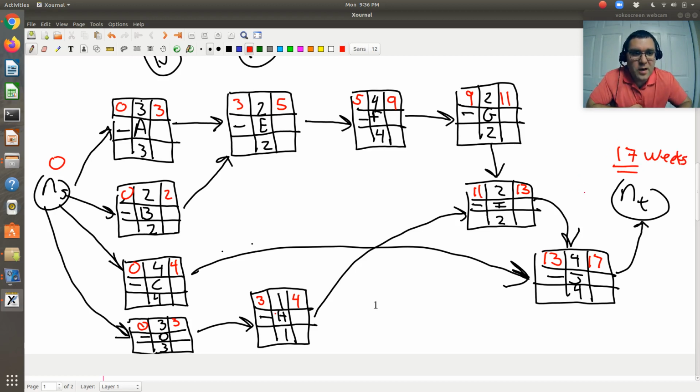All right. So now what I'm going to do is a backward sweep in which I determine the latest possible starting and finishing times of each activity in order for this project to be completed in 17 weeks. So for my terminal node, I just have one connection, and that's to J. So the latest possible finishing time of activity J is going to be 17. And so it has a duration of 4. So the latest possible starting time of J is 13. Okay, and then let's move backwards.